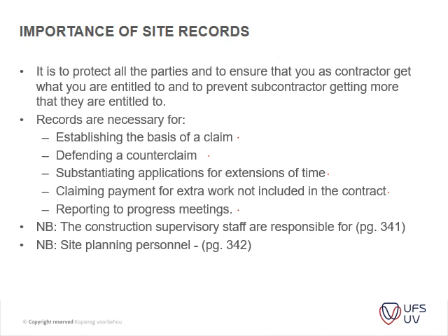So your supervisory staff is important or responsible for maintaining your daily diary, recording time lost per day due to exceptional rain, cold, keeping records of contractor laborers, his subcontractors, recording verbal instructions, architect or his clerk of works, and additional excavation works, etc. Issue of drawings, material received, recorded, and then your day work records.